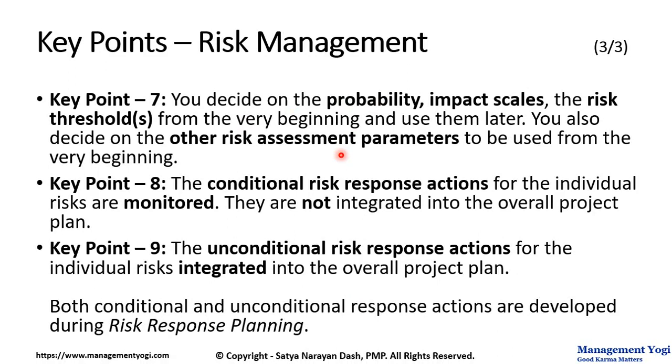Key point 8. The conditional risk response actions for the individual risks are monitored. They are not integrated into the overall project plan or the overall project management plan. Key point 9. The unconditional risk responses for the individual risks are integrated into the overall project plan. They are not monitored. And because they are integrated, they will impact the project schedule and the project budget.